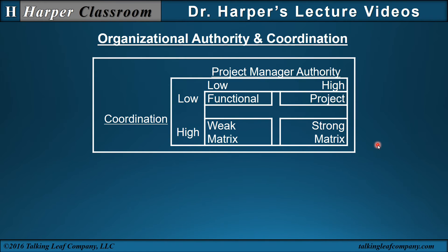For organizational authority and coordination: low authority and low coordination for the project manager corresponds to mostly functional project management. Very high project manager authority and high coordination is a strong matrix. The most project manager authority is in the project management structure. And the weak matrix has low authority but high coordination.